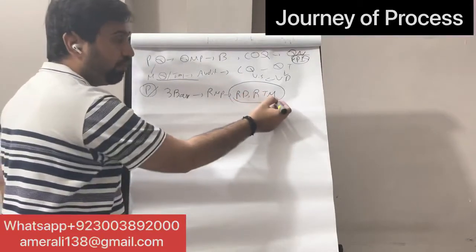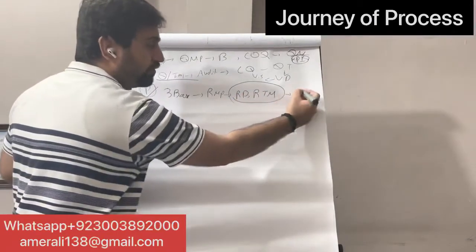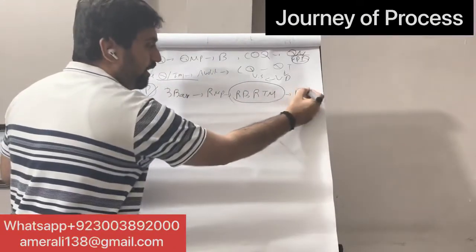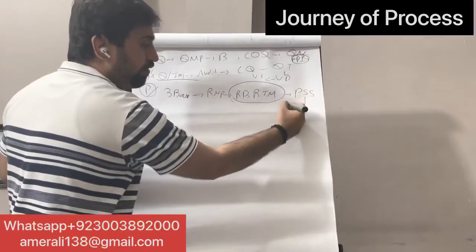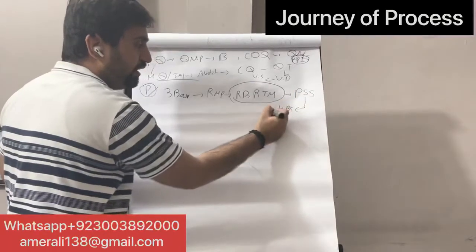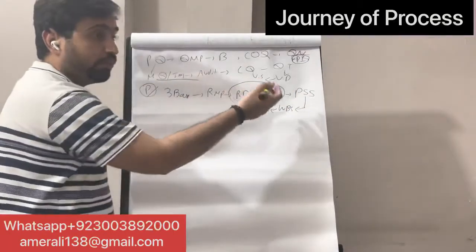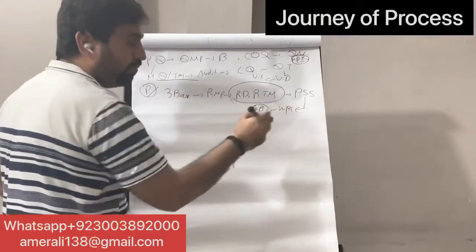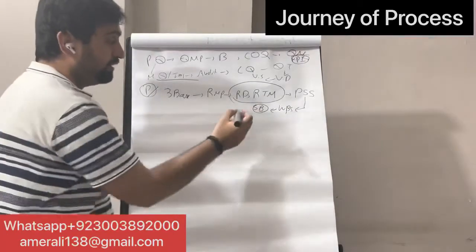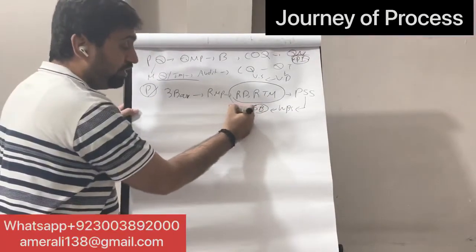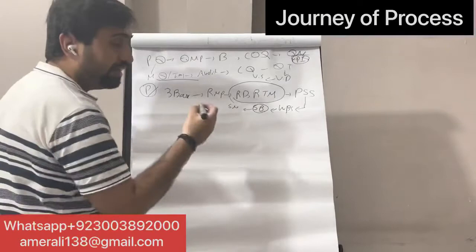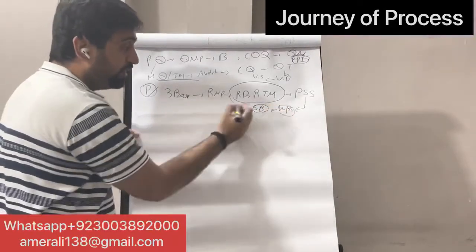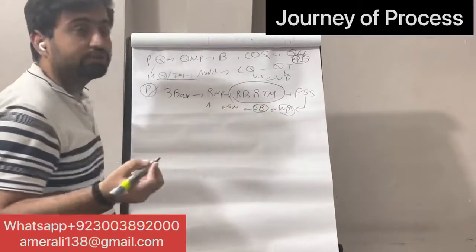Requirement documentation, requirement traceability. Then we put the filter of scope on it: which things are in the scope or which things are not in the scope. We make the project scope statement. Then we make the WBS, the work breakdown structure. WBS dictionary plus approved project scope statement is called the scope baseline. You see, the lowest part of the WBS is called a work package. So then we move toward the schedule baseline. We make the schedule management plan. So once the schedule management plan is done and approved, we divide the work packages into activity list, activity attributes, milestone list.